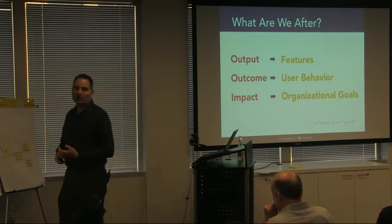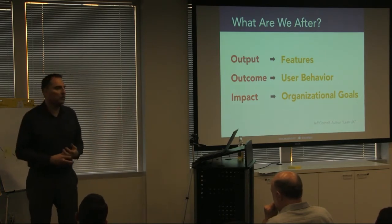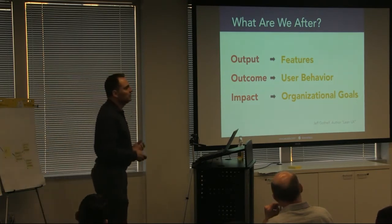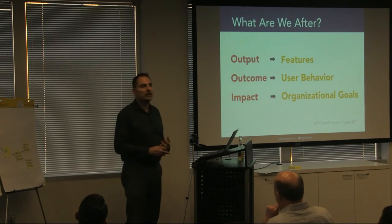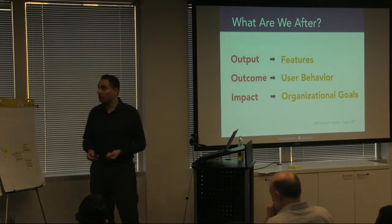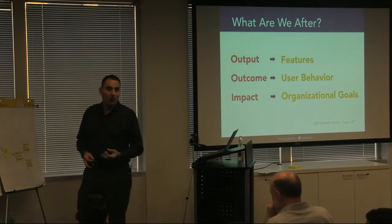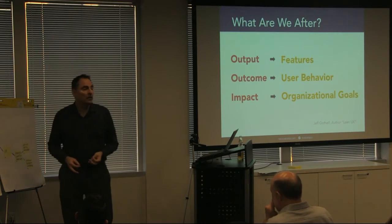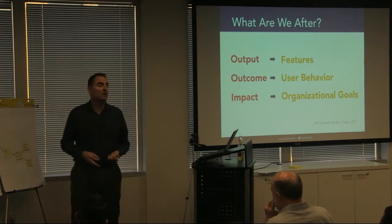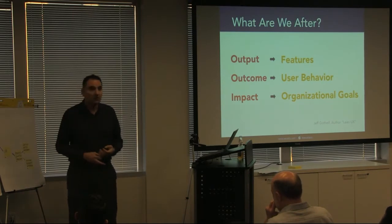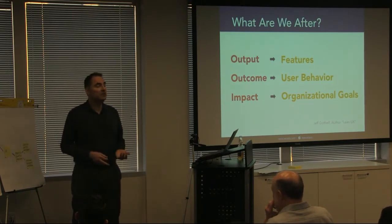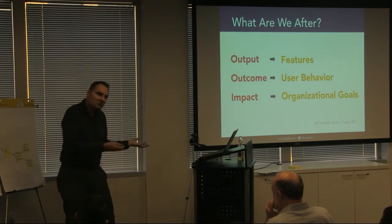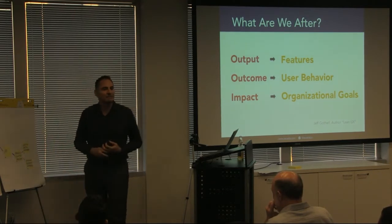Gojko Adzic, the guy who wrote the Impact Mapping book, told a story at a conference about an IT project at the BBC in England where, after three years, they had burned 75 million pounds before somebody finally realized it was very unclear what value this project had actually produced to date.